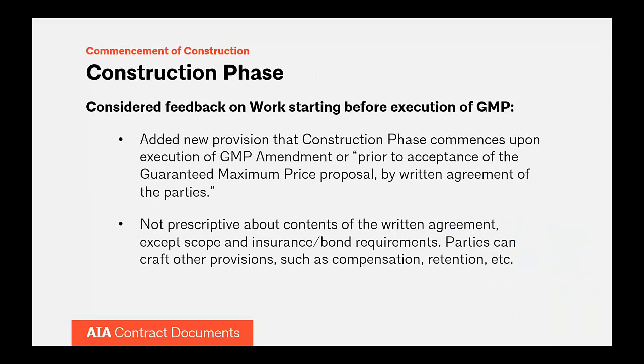Another advantage in CMC delivery is our ability to fast-track work or create early release packages. This can be as simple as early ordering long lead time equipment, locking in materials pricing in escalating markets, to actually releasing and starting some portion of the work while the balance of the project is still in design or construction documents. While the start of construction is pretty black and white in traditional bid, it's really a gray area in CMC work when it begins.